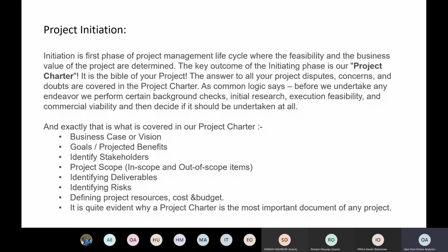Then identify your risks. The risks are usually documented in the project offers and in your proposals, but you must know them and know the mitigators, that is, how you can avert them. One popular risk that we normally face as an analytics team is memory space utilization risk. Many times we easily run out of memory. So what we usually do to mitigate the effect is to always request a very, very large memory, so that before we run out of it, it will take a long while.